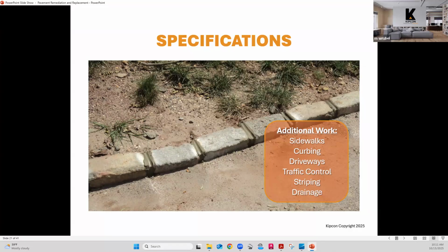If you're doing a phased project, you want to start, and we always try to keep in mind not only where the roadways are in a community in a phased project, but the condition that they're in. Ideally, you want to start in the back of the community, the cul-de-sacs, the areas that you're not going to drive over again as you move out of the community with each phase. So it's important to keep in mind. So you may have a really beat up entry roadway, and some less beat up cul-de-sacs in the back. You still want to do those cul-de-sacs first.